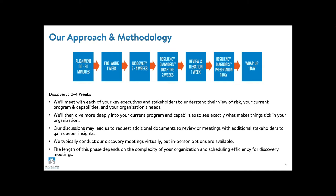These discussions often lead us to request additional documents to review or meetings with other stakeholders to gain deeper insights. We typically conduct these discovery meetings virtually, but in-person options are also available. The length of this phase depends on the complexity, size, and scope of your organization, and the scheduling efficiency of getting discovery meetings set up. We can move through this phase more quickly if we have back-to-back meetings over several days, as opposed to stretching them out over several weeks.